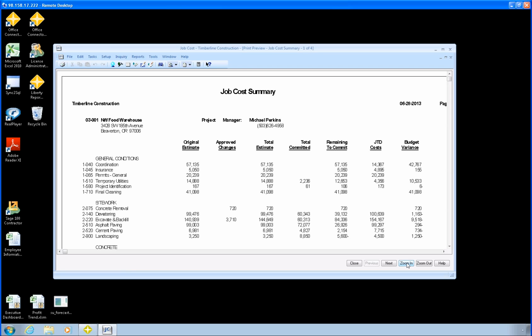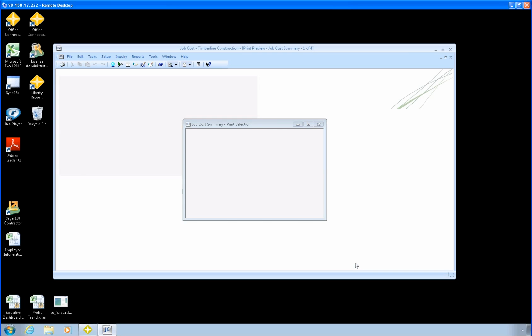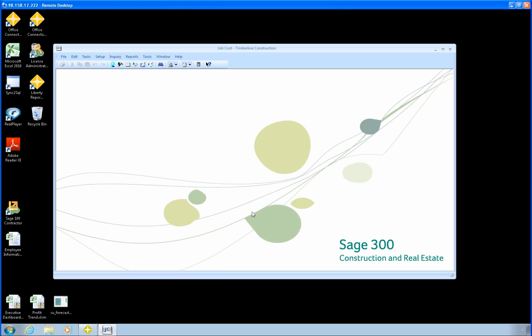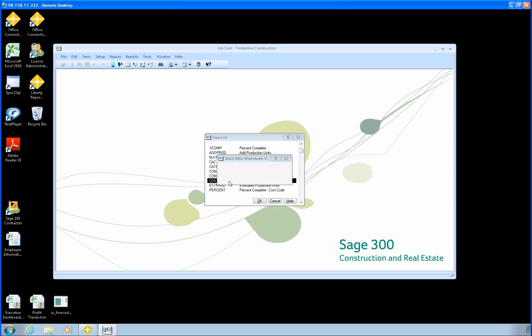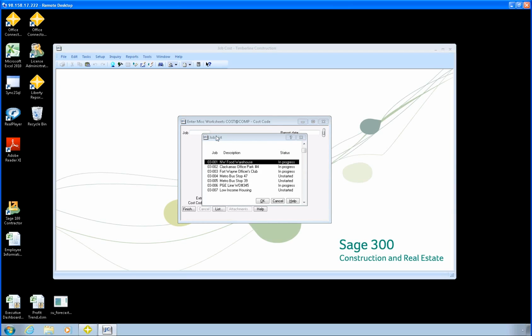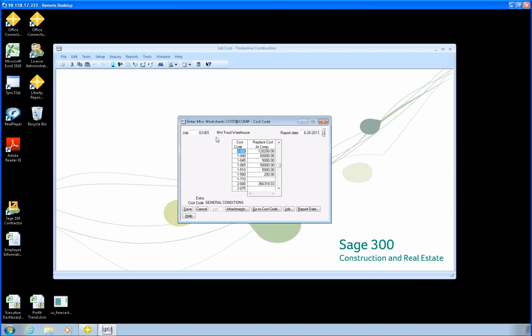Now that data would be in the database, and they were able to produce another report showing the calculations that result. Taking whatever the input was from the project manager, combining that with the actual values, they would calculate things like over and under, projected cost of completion, projected profit, things like that. The problem with that is they identified for us a few challenges. One was just the time it takes to do that whole process: printing the reports, soliciting the feedback, entering the data into miscellaneous worksheets.